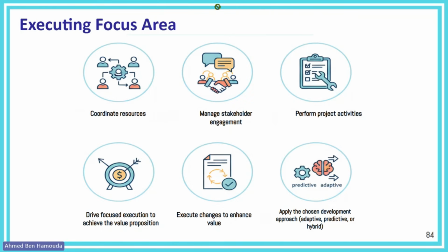Now, let me explain to you the difference between changes that enhance value and reactive changes. Reactive changes are changes that take place when something went wrong with the schedule, or when we exceeded the budget, or when we're not going to deliver exactly what's in scope. That's a reactive change. But changes that enhance value are proactive changes.